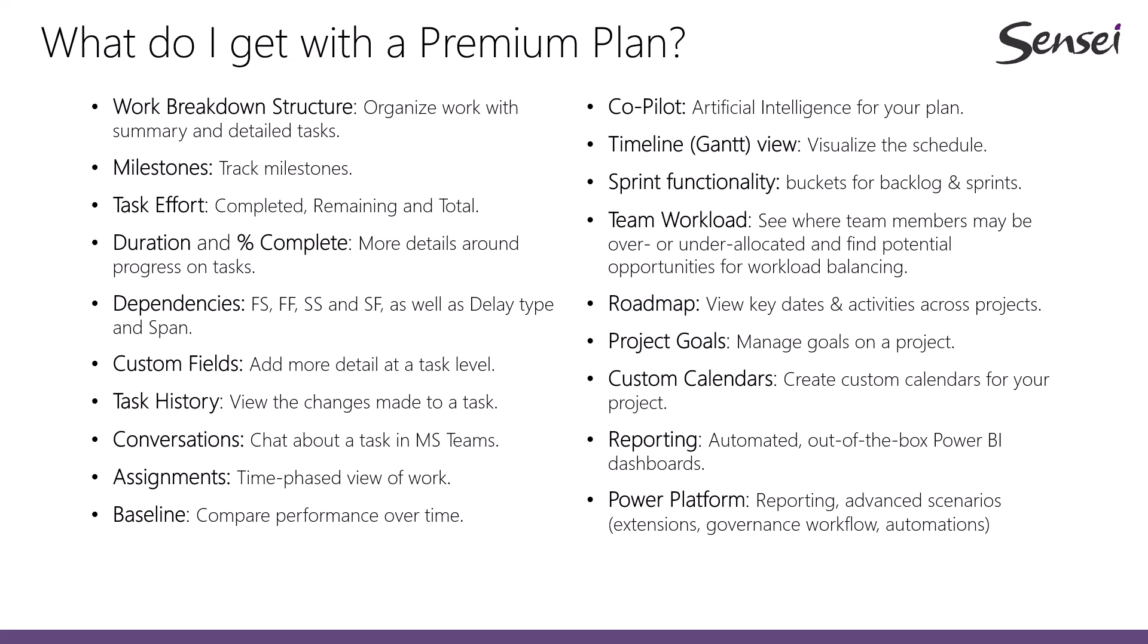With a premium plan, you can build a traditional work breakdown structure. You get milestones, task effort, duration, percent complete, dependencies, custom fields, task history, conversations, assignments, baseline, co-pilot, timeline view, sprint functionality,